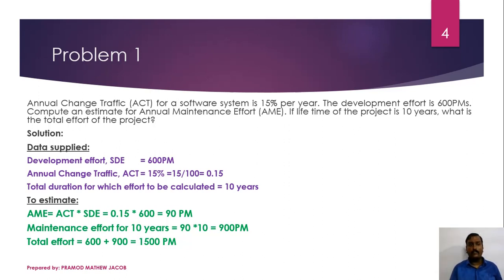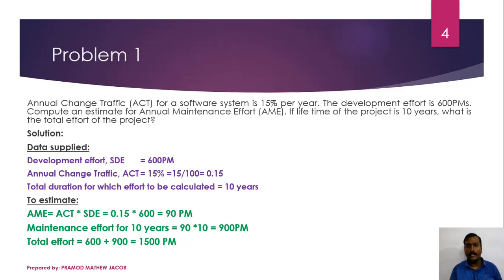We have to find the total effort of the project. The data supplied: development effort SDE is 600 person months, annual change traffic is 15%, so 15 divided by 100 equals 0.15 as the ACT rate, and the total duration is 10 years. Annual Maintenance Effort AME equals ACT into SDE, which is 0.15 into 600, which equals 90 person months. The maintenance effort for 10 years is obtained by multiplying AME into 10, that is 90 into 10, which equals 900 person months.